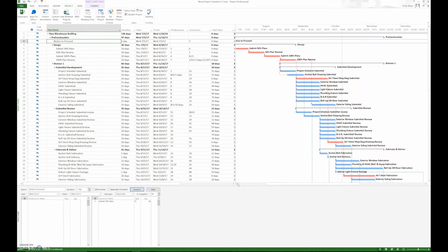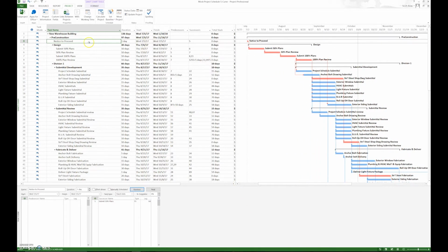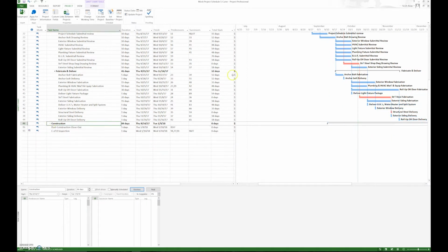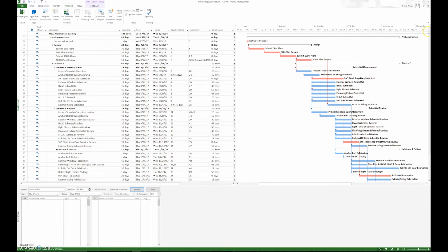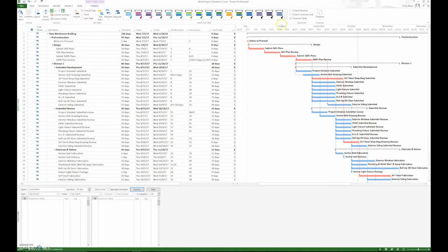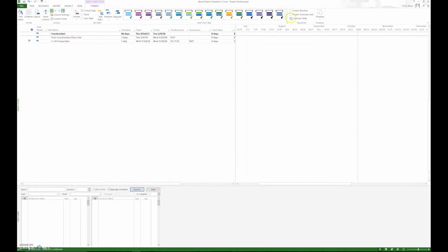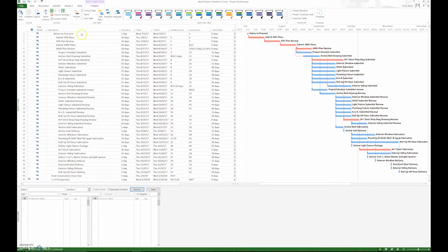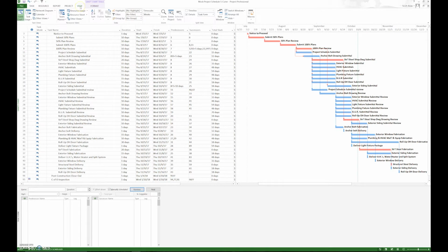If we compress the schedule twice and now we know it fits in the time frame, we're going to walk through activity by activity to make sure it makes sense. This is what I like to do. I like to close individual line items, individual summary tasks like construction, and then what I want to do is remove the summary task at that point, and then I'm able to look from start to end within a summary task and look at exactly what tasks take place.